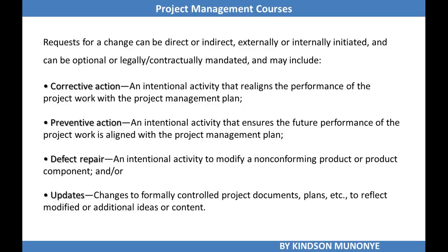We mentioned that requests for a change can be direct or indirect, externally or internally initiated, and can be optional or legally or contractually mandated. It can be corrective action, which realigns performance of project work with the project management plan. Preventive, which ensures future performance is aligned. Defect repair modifies non-conforming products and updates changes to formally controlled project documents.